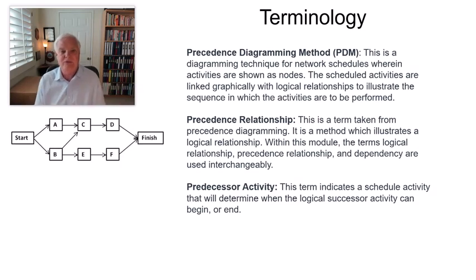I'm going to walk you through 3 different elements so you can see in the project flow that we've got set up off to the side. You start in the start box, you finish in the finish box, and there are 3 paths through this project. In the illustration I have, path 1 would be blocks A, C, D. You start, you go to A, C, D, and then you finish.